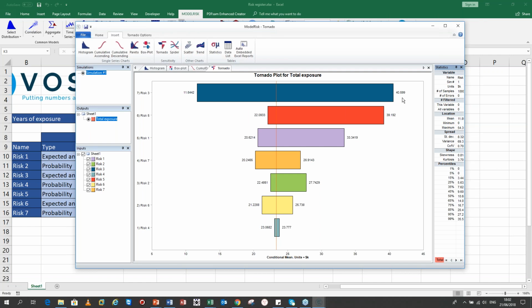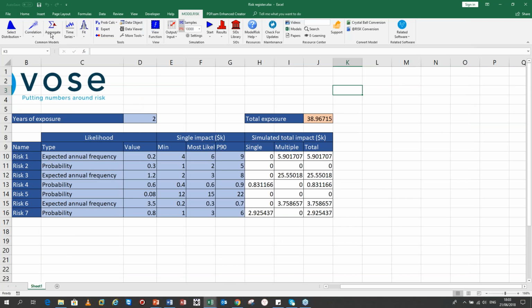If you have another risk that was just one fixed extremely large value, but with 99.99999% certainty of occurring, it wouldn't contribute a great deal to the uncertainty. It would just shift over the risk, and basically you should take it as certain that it's going to happen.